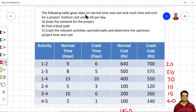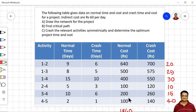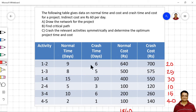Here is our problem statement. The following table gives data on normal time and cost, and crash time and cost for a project. We have been given the activities, normal duration, crash duration, normal cost, and crash cost of each activity. Normal time is the time when everything is normal — how long it takes to complete one activity. For example, activity 1-2 normally takes 9 days, but if you are ready to pay extra, it can be completed in 6 days. The normal cost for activity 1-2 is 640 rupees, but to complete it in 6 days instead of 9, you have to pay 700 rupees.